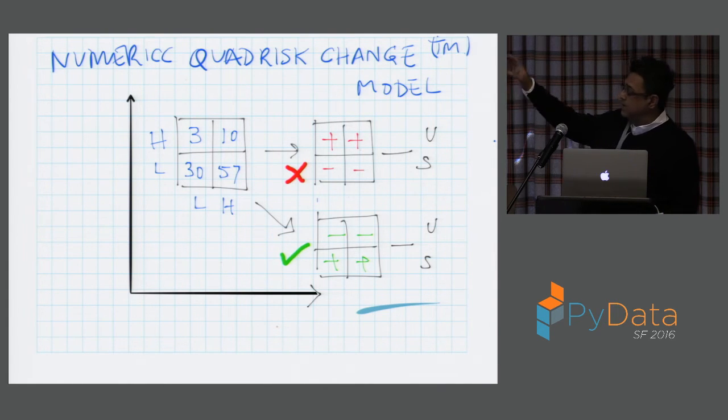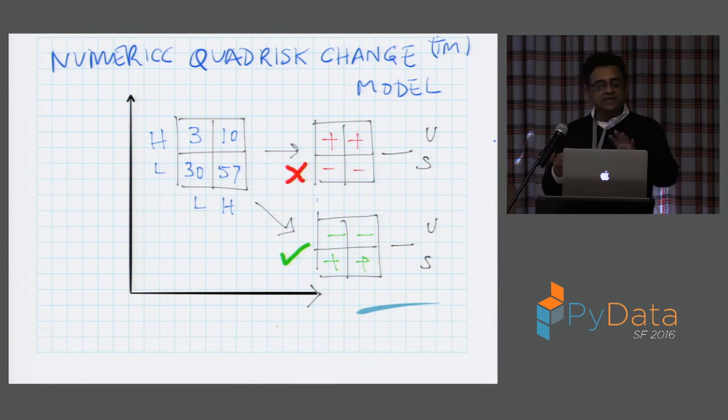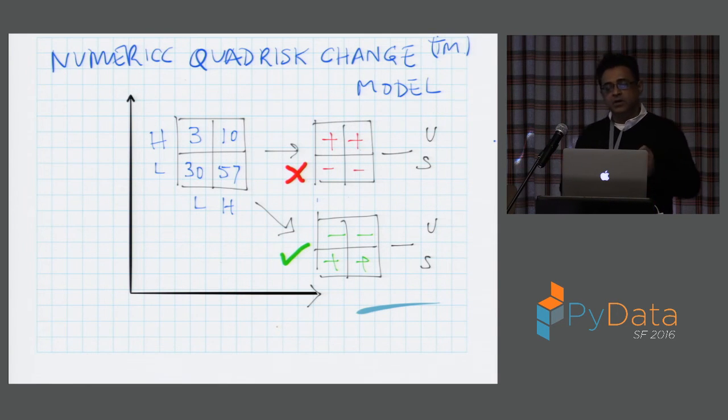So I've put in some numbers here. 3% are brittle, and assume that 10% of your code base is changing for every iteration, and that's 13, and I just made up some other numbers to put in the bottom. The idea here is, these are percentages. So even if you keep adding files, this is a percentage number. So from one week to the next, from one iteration to the next, are the numbers above the line growing higher, or are the numbers below the line growing higher? If above the line the numbers are going higher, you have a problem. And if below the line your numbers are growing, then you're doing better, and you're able to damp the risk.